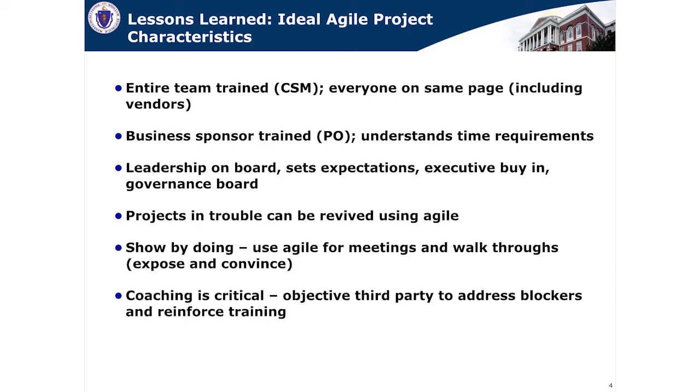Business sponsor training, really need to understand the time commitments. So Tom just talked about the traditional method where you write up the requirements document, send it over, they say yes, and then they feel like their part's done until all the building happens and then this beautiful package arrives and they react to it. That's not the case, as we've been talking. There's an expectation that those people are going to be actively involved, if not on a daily basis, certainly on a weekly basis, providing feedback, thinking about things, and identifying requirement changes in real time. And that's a big difference. And we owe them the training and the explanation about how that's going to work.